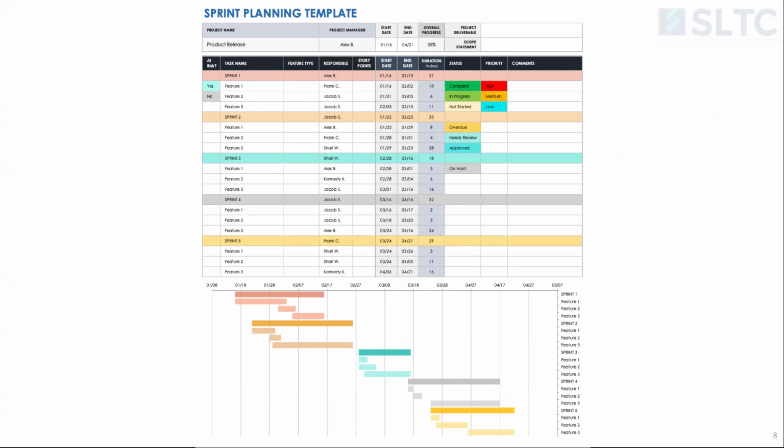Yeah. So what we do is when you are developing, when you are picking things for a sprint, we add those story points to come to a certain conclusion. Let's say we can only do 50 story points per 2 weeks in our organization, right? Because this depends on every organization, every person also. Okay. So I said 3 because of the people we have. If we have very experienced people, they might say, oh, I'll do it within story point 2. Right. So it actually depends on the staff skill set.